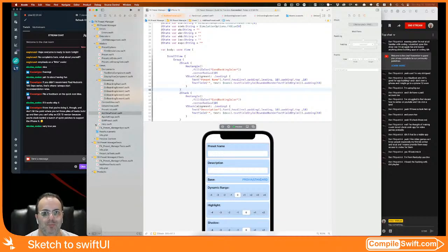That's where your planning comes in, right? Plan interim releases to fix that code or refine it before the next feature, something along those lines. Always a very delicate balance. When I'm working with developers, as someone who oversees the apps and is responsible for them, I like to ship and then fit in a Scrum sprint, which is like a 2-week thing, where we say, okay, now we're going to go back and fix up the things we know we need to do before we do the next thing.